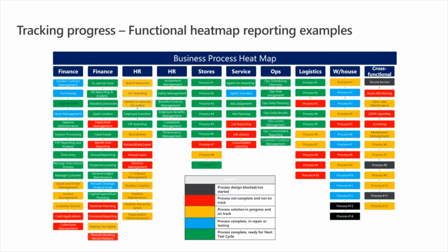I've got 2 blocked things and I've got 5 things that have been in test for a while. Is there a quality issue? Why is it going through repeated test cycles? I've got 2 things that are delayed. I've got 3 things that are not done, but they're telling me they're on track. I ought to pay some attention to the warehousing work stream.